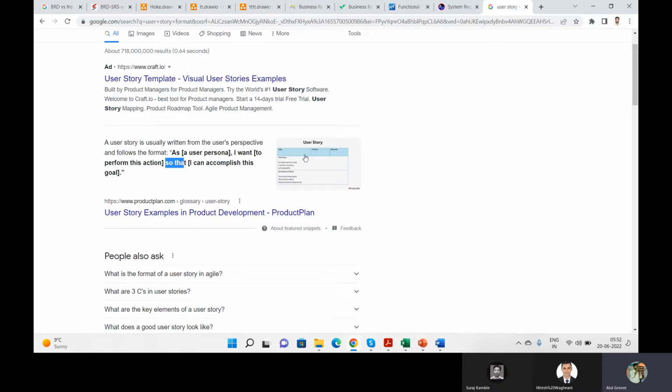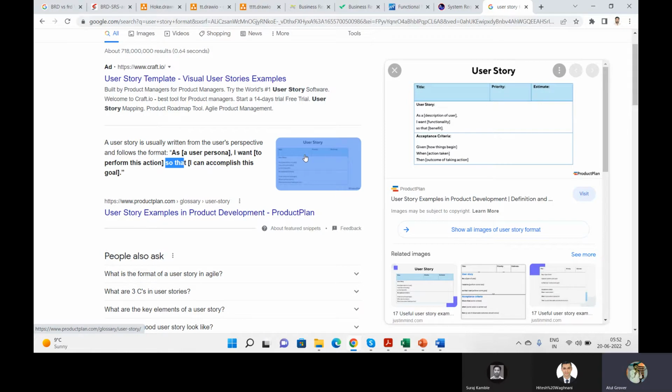So this is the way that we write the user story. So like this format, they use it. Now what happened actually, that I saw there's a lot of BAs who write a story but they don't put the benefit. जब तक benefit नहीं होगा, then how my company, my organization know that what I am developing, what value, remember the business value, business goal, वो यहां से आता है. अगर ये नहीं लिखोगे तो how my organization know, how my project manager know कि boss what business value we are achieving here. So these are the few points which you or me need to consider when we're working on the business analyst part.